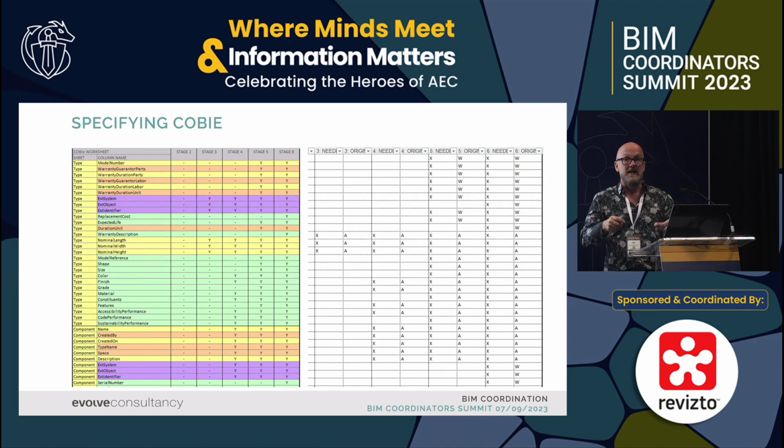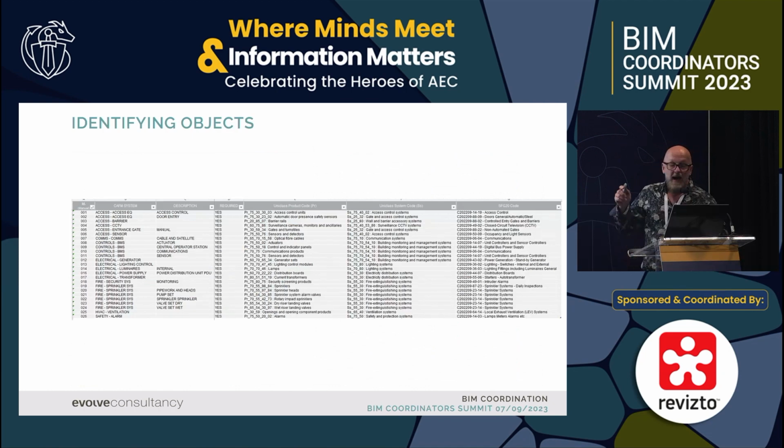The rooms will be numbered R1 for the floor, and then a sequential number after it. That's the kind of level of detail we go to. That's all that people need. Just follow that through for every piece of data that the FM system needs or George needs at the bottom of the garden to deliver. And you've got the information that you can then check and make sure it's correct at any stage of the project.